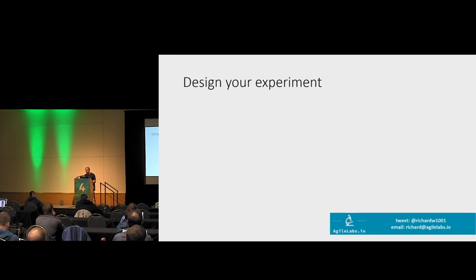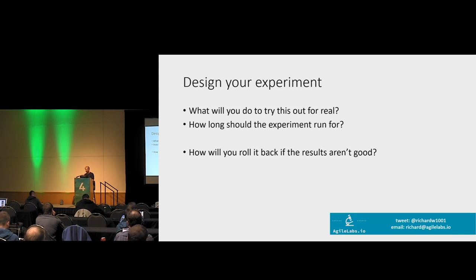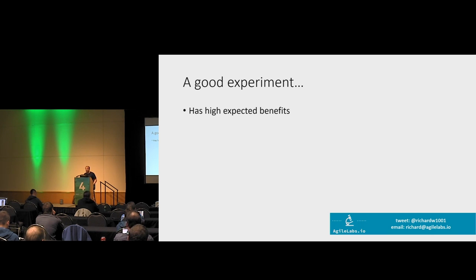When designing the experiment, start with: what are you going to do? What's an actual step you can take, preferably now or tomorrow? Think about how long the experiment should run — if you say you're going to try TDD for a day, you won't see results because it's a skill that takes time to learn. And a really important one: how will you roll it back if it doesn't go to plan? If you say 'we're going to rewrite everything in a different language,' not only is the cost really high, the rollback is really hard too. A good experiment has high expected benefits, changes the important things, has low expected costs, gives fast feedback, and can be rolled back.